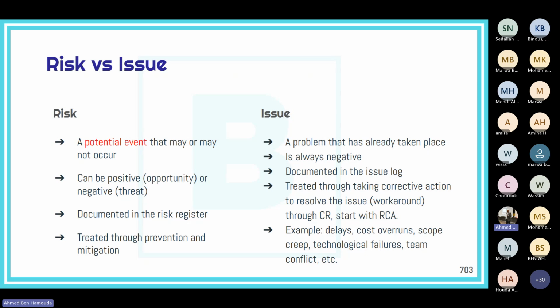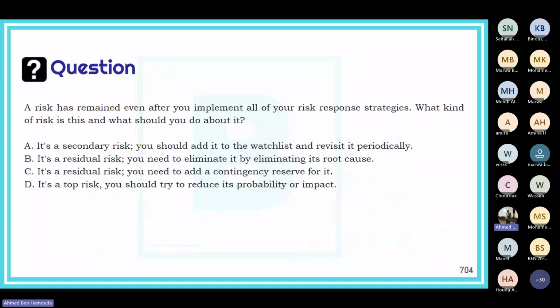Okay, so always when there is an issue, start with the root cause analysis, then define an action plan, raise a change request, and then once it is approved, implement that change request. Okay, all right.